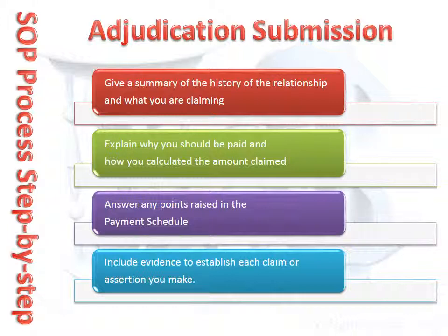The submission is the guts of your application. It is in the submission you advise why you are entitled to be paid the whole amount of your claim and counter any arguments from the client for non-payment. If there is no payment schedule, you must still explain your entitlement to the amount claimed in the payment claim, though you can of course be a lot briefer than when there is a payment schedule.